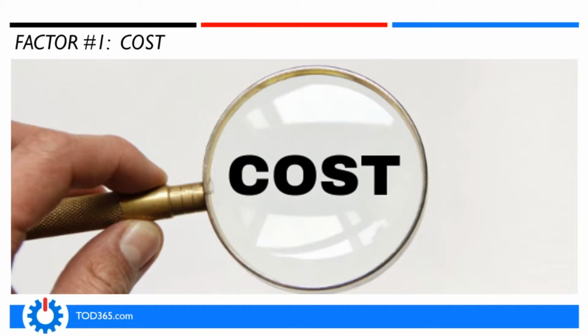A company did a recent upgrade. Their initial implementation of AX, somewhere between 2 and 3 years ago, cost X. The initial upgrade budget was 2X. And before everything was completed, and the company had added all their change orders and all the other things they wanted to do based on the upgrade, it was even bigger than that and is now rapidly approaching 4 times X. That's 4 times the cost of the original implementation. The odd thing about this project is that it was completed on time based on the customer's expectations, and they're actually happy with the result.